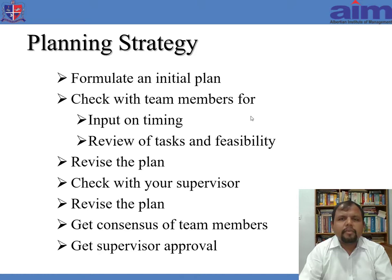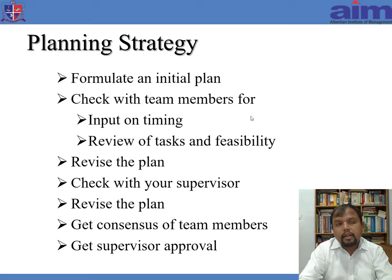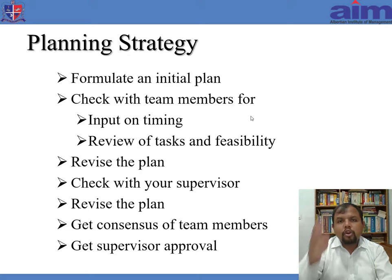The next step is planning strategy. Formulate an initial plan and check with team members for input on timing, review of the task, and feasibility. If team members say the timing should be changed, the task can be adjusted, or a task can be allocated to someone else, revise the plan. Once revised, check with your supervisor for feedback, then show it to the team members, get their consent, and get approval from both the client and supervisors. Planning strategy is of utmost importance because this plan guides the entire project development.